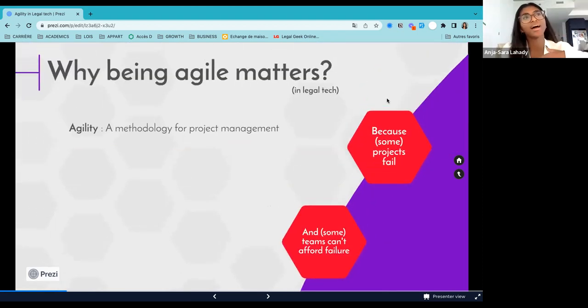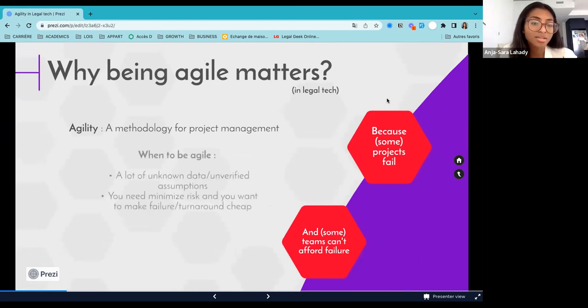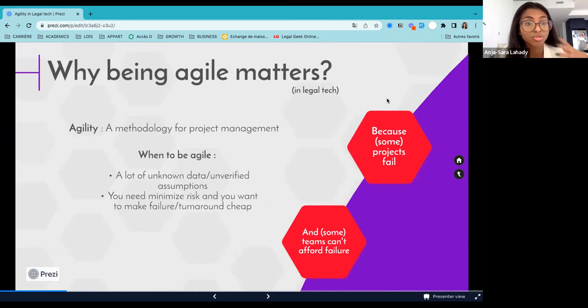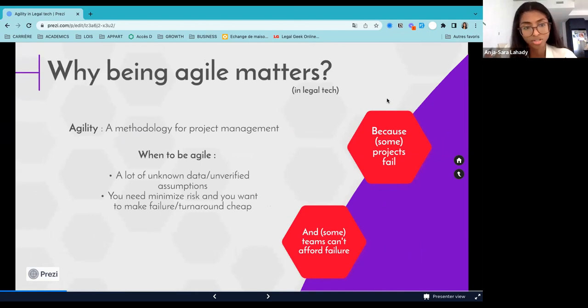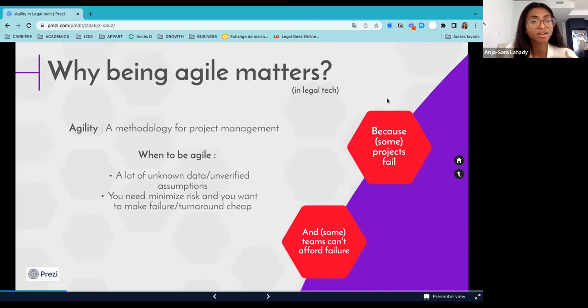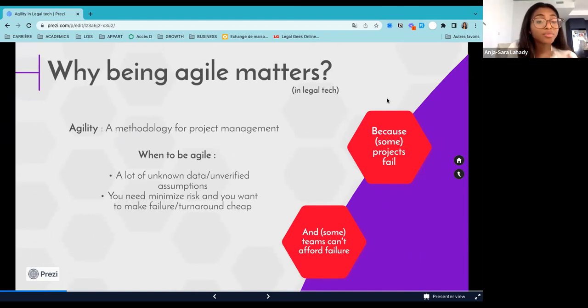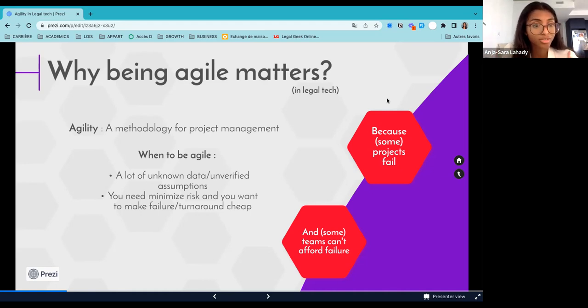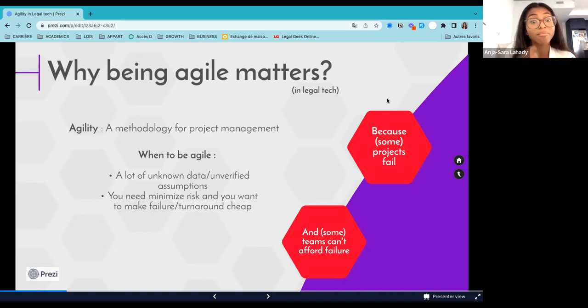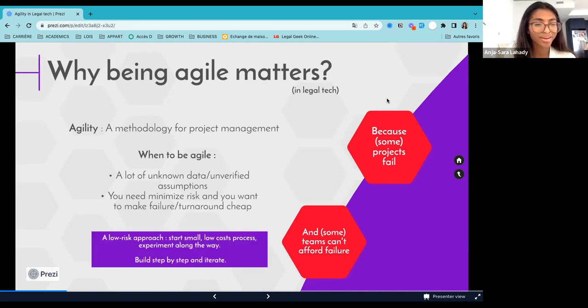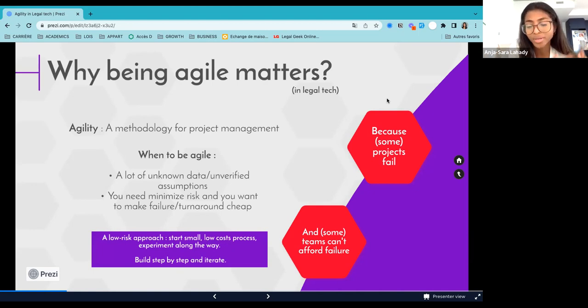So while in this dichotomy, I asked who needs to be agile, it's more a question of when do we need to be agile? Because it doesn't mean that large organizations do not have to be agile in some specific projects. Big law firms may need to be agile when developing a legal tech project because there's a lot of unknown data or unverified assumptions about the customer. We don't know if the actual end user, the legal customer, the traditional legal customer actually wants to use a product to automate their NDA, let's say. So you want to have this approach. And sometimes you also have limited budget or limited time, limited resources, human resources allocated to legal tech. So you need to minimize the risk associated with developing a legal tech project, and you want to make failure or turnaround cheap. So basically, that's when an agile approach comes in handy, you need to have a low risk approach. So you start small, it's a low cost process, and you build along the way. So you experiment along the way and you learn as you go. So you build your project step by step and iterate.